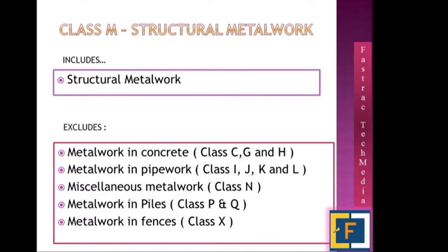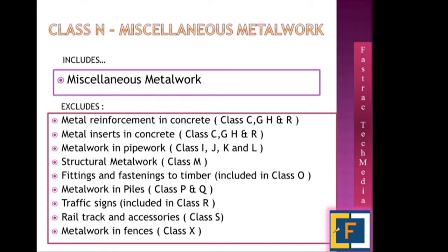Structural metalwork is in class M, but it is not included in whatever metalwork in concrete or pipe work or piles or fences. So don't think that this is included in reinforcement. In miscellaneous metalwork, again you will get confused that a lot of other classes are excluded.